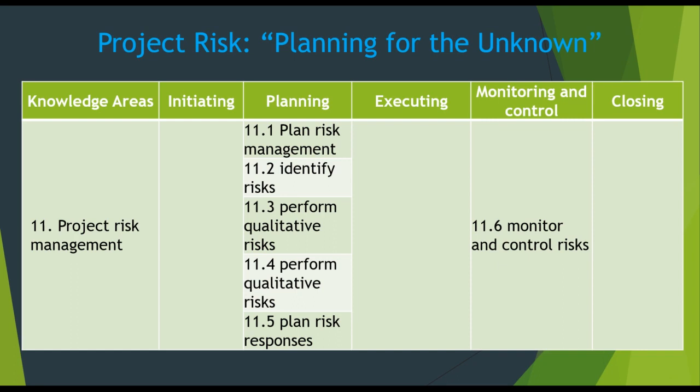Project risk management — the project manager should conduct risk management work, then identify and analyze the risks. Later, they should develop a risk response plan which will control risks on an ongoing basis. It all depends on how one performs quantitative and qualitative risk assessments. The processes are: plan risk management, identify risk, perform qualitative risk analysis, perform quantitative risk analysis, plan risk responses, implement risk response, and monitor risk.